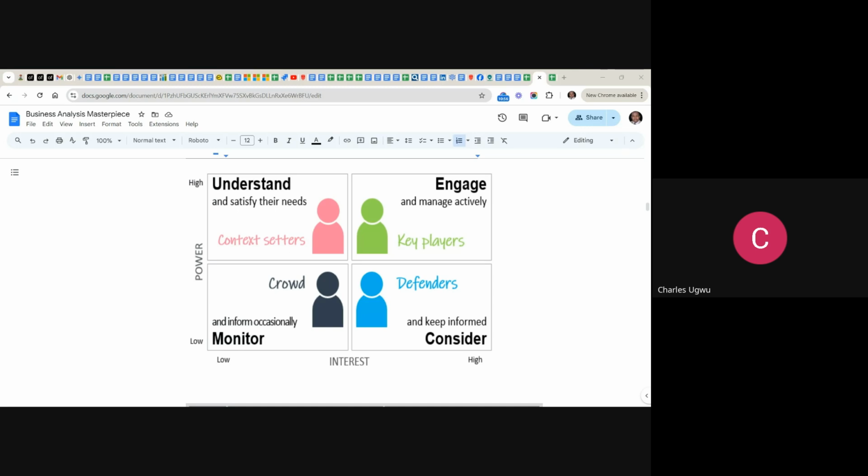So he's the person that is securing the funding. He secured the funding for that project. So in that organization, because he secured the funding, he is the project sponsor, not the finance department. They are not the people financing the project. The finance department is just a channel of payment. I want you to understand that.